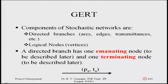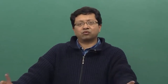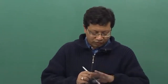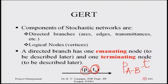A directed branch has one emanating node and one terminating node. That particular arc or directed branch carries two sets of information: the probability P_AB, which is the probability of traversing from activity A to activity B, and the time T_AB, which is the time taken to traverse from job A to job B.